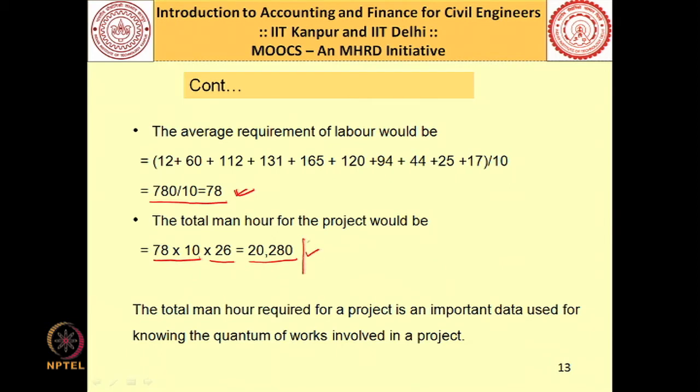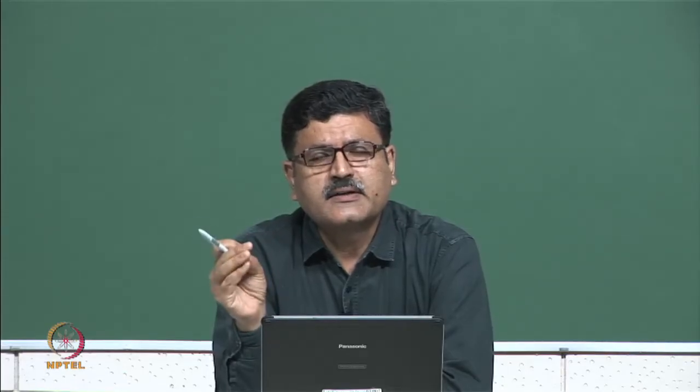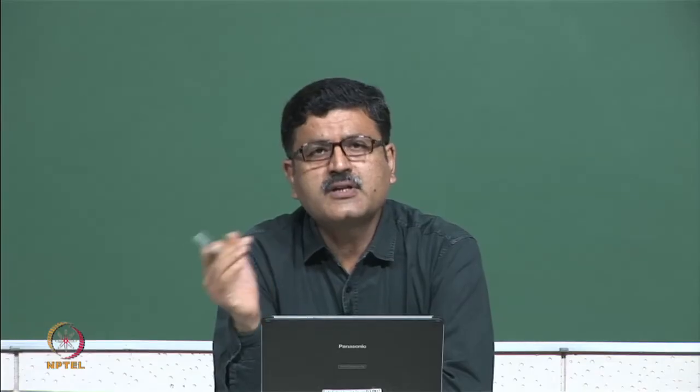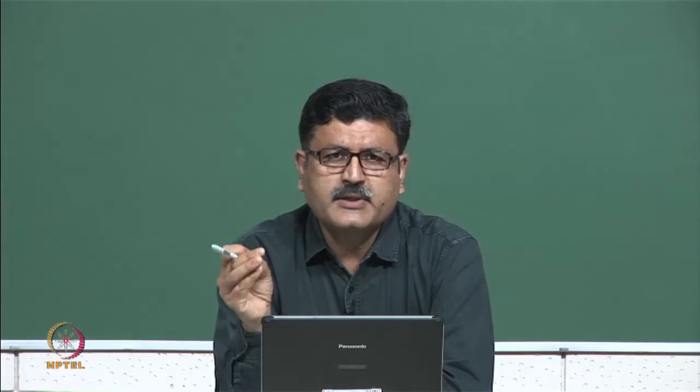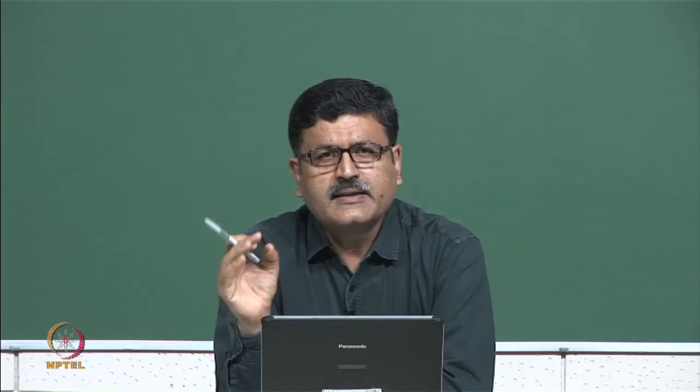Now, this man-hour figure is very important. If you want to compare different projects, let us say across different countries, cost terms will not give you a correct comparison. But if you talk in terms of man hours, whether million man hours or so on, it will give you the nature of complexities involved in that project. So by quoting that I did a project which involved 10 million man hours or 1 million man days, this gives me the extent of work that I performed.